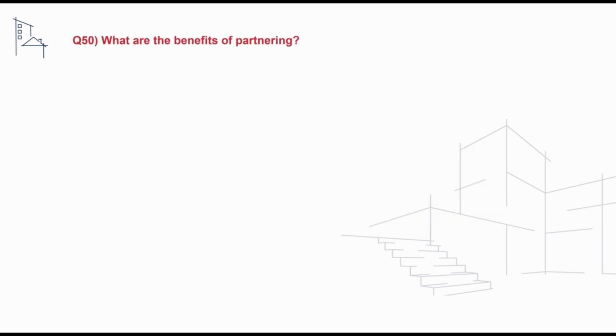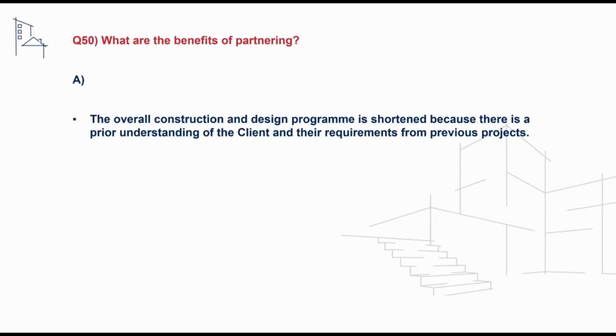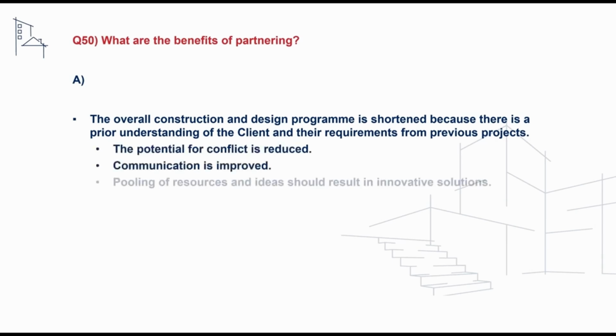We may receive another question on partnering, asking what are the key benefits of partnering. And to address this, we could say that the overall construction and design program is often shortened because there is a prior understanding of the client and their requirements from previous projects. The potential for conflict is reduced, communication is improved, pooling of resources and ideas should result in innovative solutions.